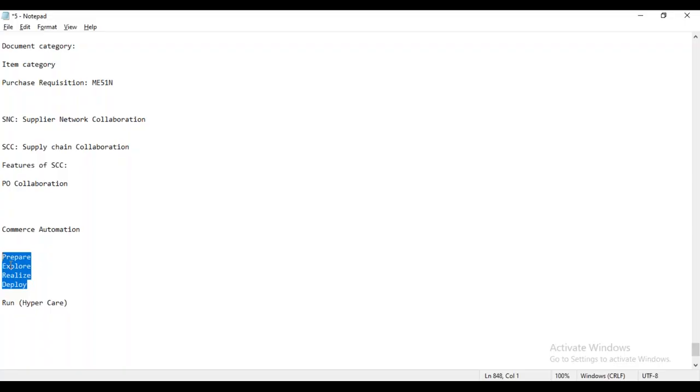In the prepare phase, we have to prepare ourselves. Generally in the prepare phase, we work on different kinds of documents. We have to work on the project scope and team onboarding, and prepare our project plan and project charter, and whatever different activities we are going to perform and deliverables we are going to deliver to our customer. All that information we have to include in different documents.